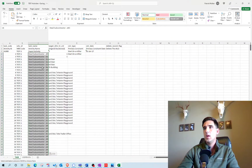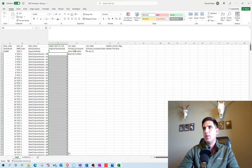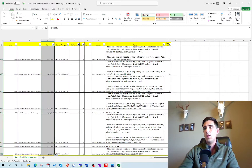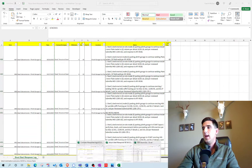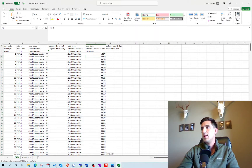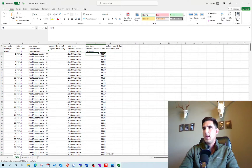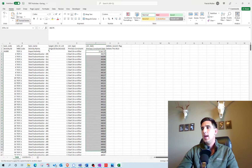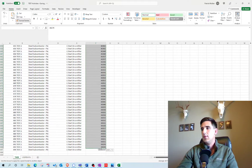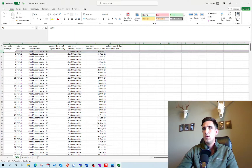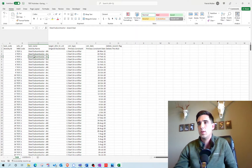Since this is the steel subcontractor, I'll make sure the WBS code is test.1 for steel — so it imports into the right WBS location. I'll copy those down. Then I'll grab the description and paste it. We have our one-day duration — copy that down. The start on or after constraint — copy that down. For the dates, I'll bring those over under the primary constraint date. You'll notice it's in the wrong format, so I'll use the Format Painter, highlight all the activities, and that will change the formatting to the correct format.